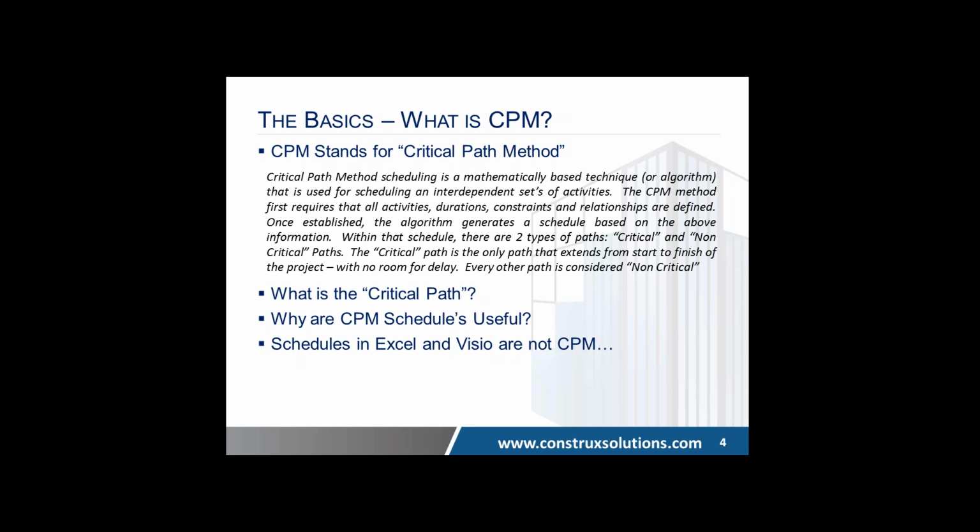It is critical that you get these activities done in the time frames that you placed on them, the durations, and ultimately in this order. And any delays that exist on that path will push out the end date of the job. And this is very important in construction. We know this because end dates being delayed costs a lot of money and starts a lot of arguments as to who ultimately caused this delay.